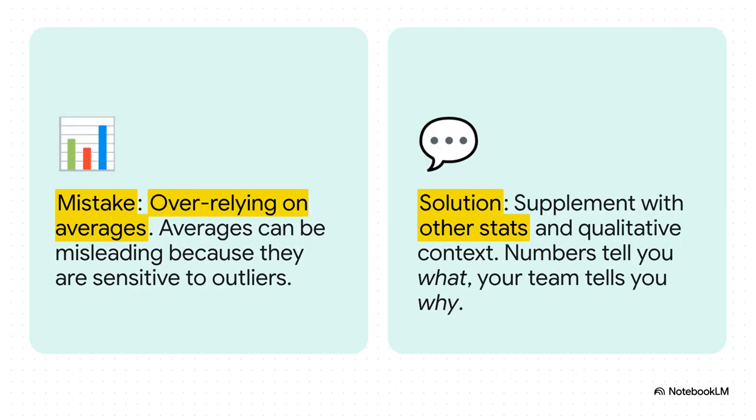And finally, be careful with averages. They can be so misleading. You've probably heard the joke about the statistician who drowned in a river that was, on average, 3 feet deep. It's the same with your data. One really gnarly, complicated ticket that took 3 weeks can totally wreck your team's average cycle time, even if 99% of your tasks fly through the system. The numbers give you the what, but you have to talk to your team to get the why.